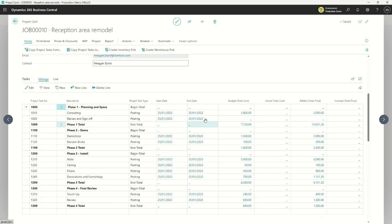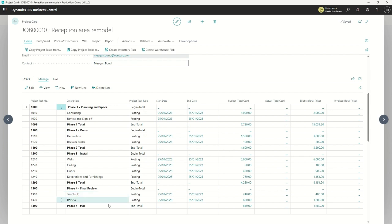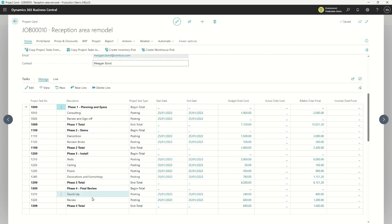Scroll down a little and we come to the lines — these are the tasks of the project. And you can see this is laid out very similar to a work breakdown structure that you might see in Microsoft Project or any other project management tools. This project is split up into separate phases, and within each phase there are a number of tasks.